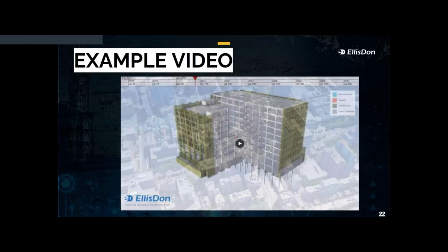For example, if you have Navisworks and a schedule coming in, you can integrate the schedule into Navisworks to create a very generic 4D model. That's usually something that a lot of project teams have. Other times, for more specific 4Ds, for instance in my cases, I use Synchro, which is similar to Navisworks, but more specialized for the scheduling elements. Right, so hopefully that answered your question.